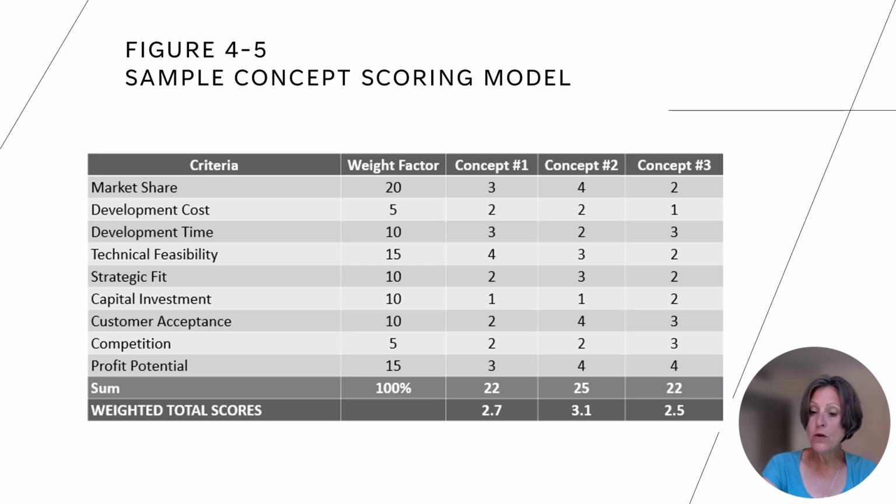Sales and marketing take over training for product usage while R&D is deployed for manufacturing troubleshooting instead of technical research. Supply chain handles raw materials and distribution rather than the specialized functions represented within the NPD team. The new product design and development team is typically dissolved during Stage 5 as the product is transferred to normal operations. Project leaders and team members are dispersed to other assignments within the organization as appropriate.